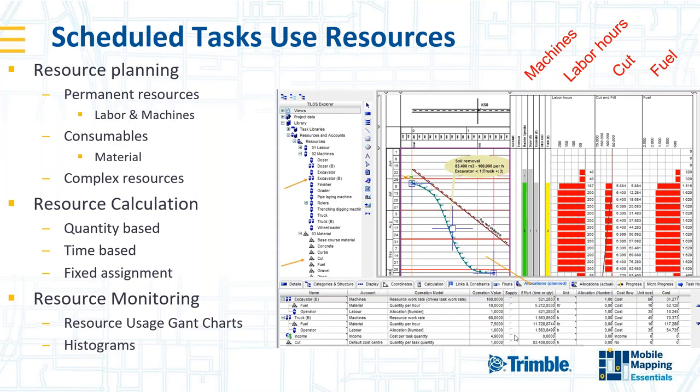Trimble has extended its connection with customers through the ability to better plan resource needs such as fuel, water, and servicing through the constructible model. You can also plug in different production rates for 3D machine control resources versus standard resources, and show the effect on production rates and associated costs like service and fuel, or specific activities and what that can do to the overall project schedule.